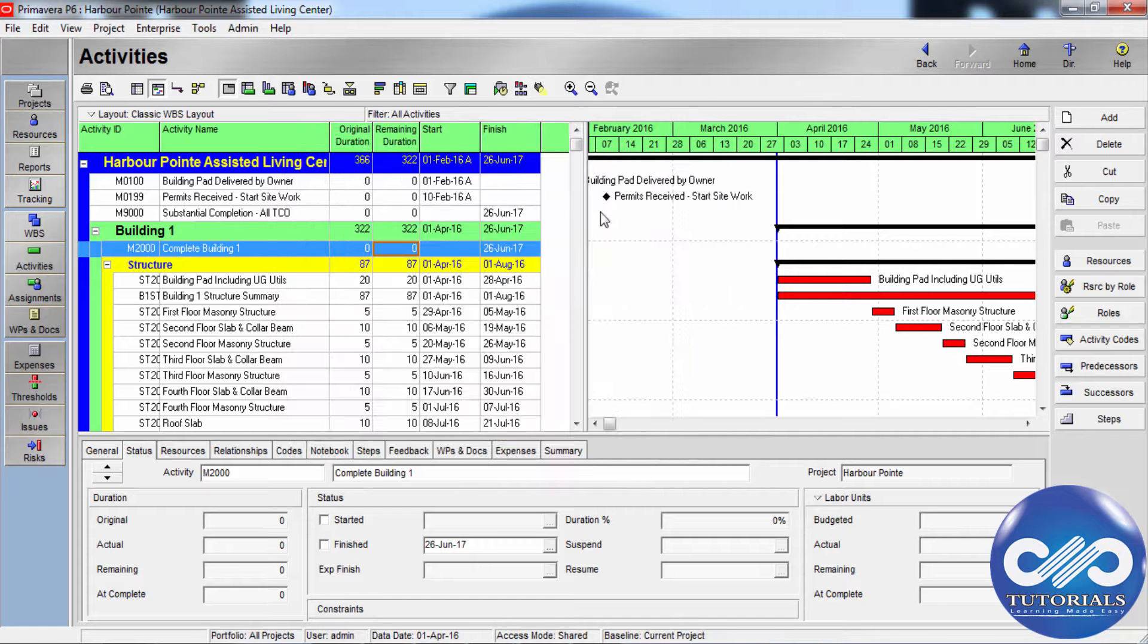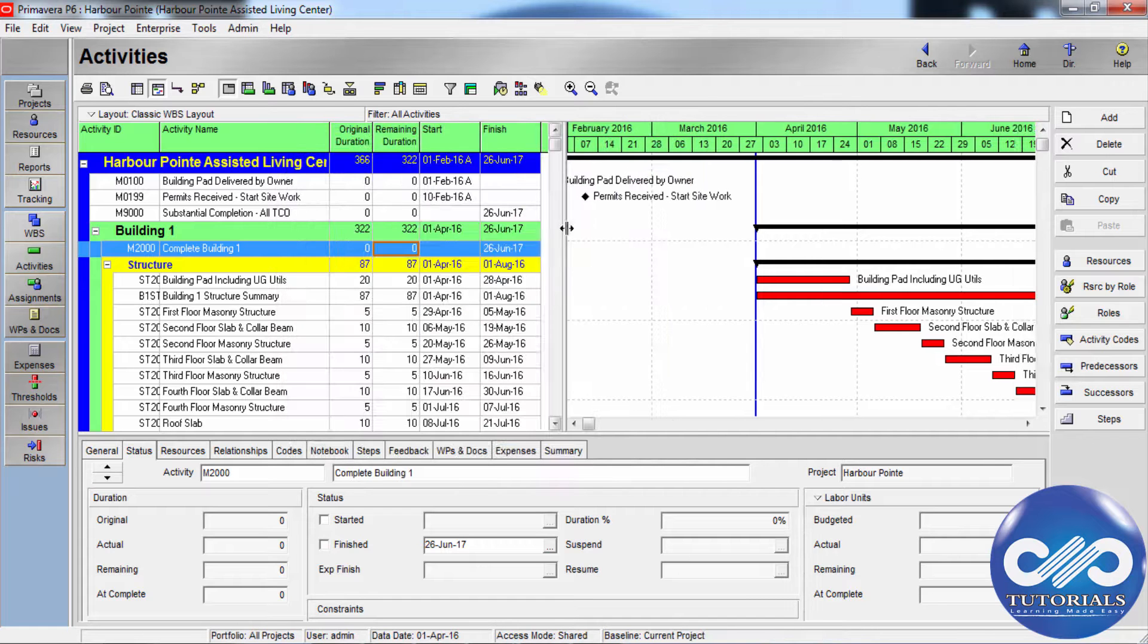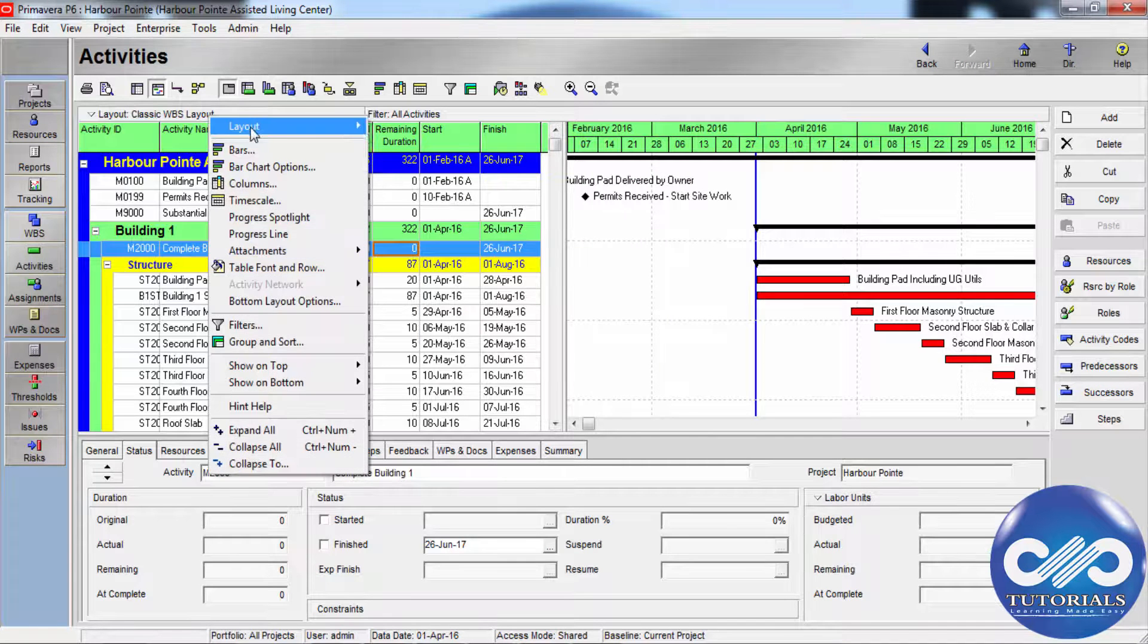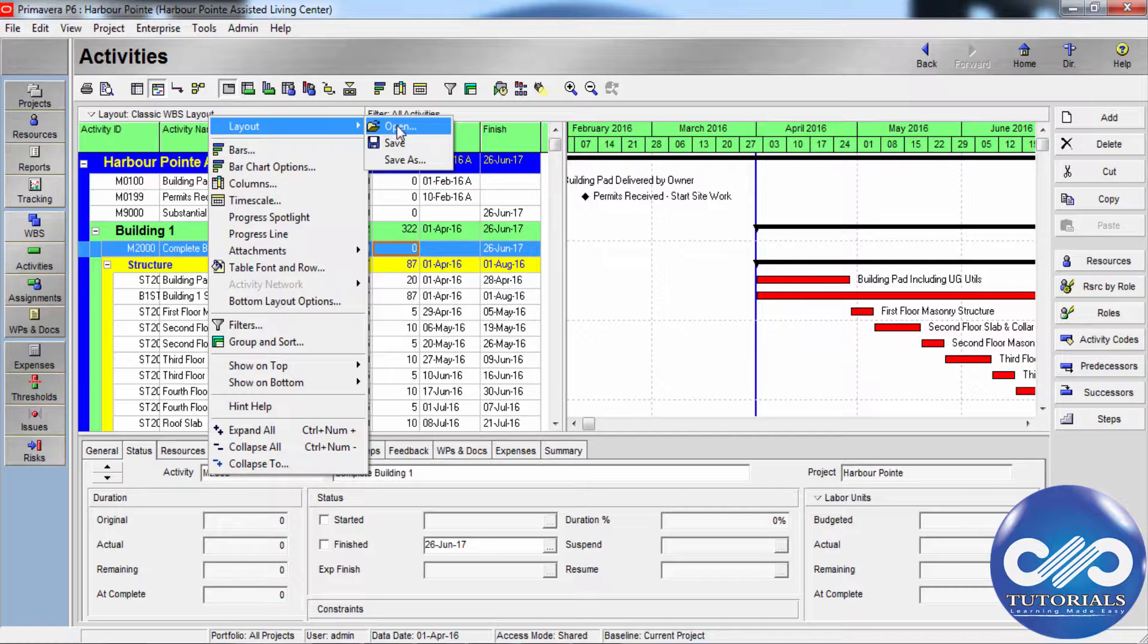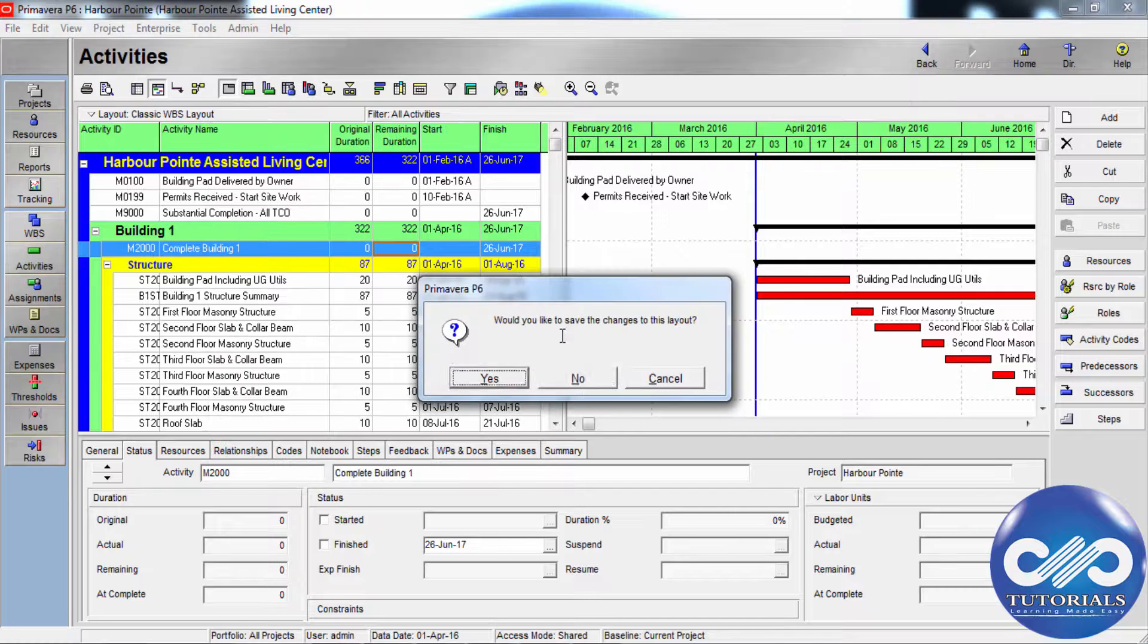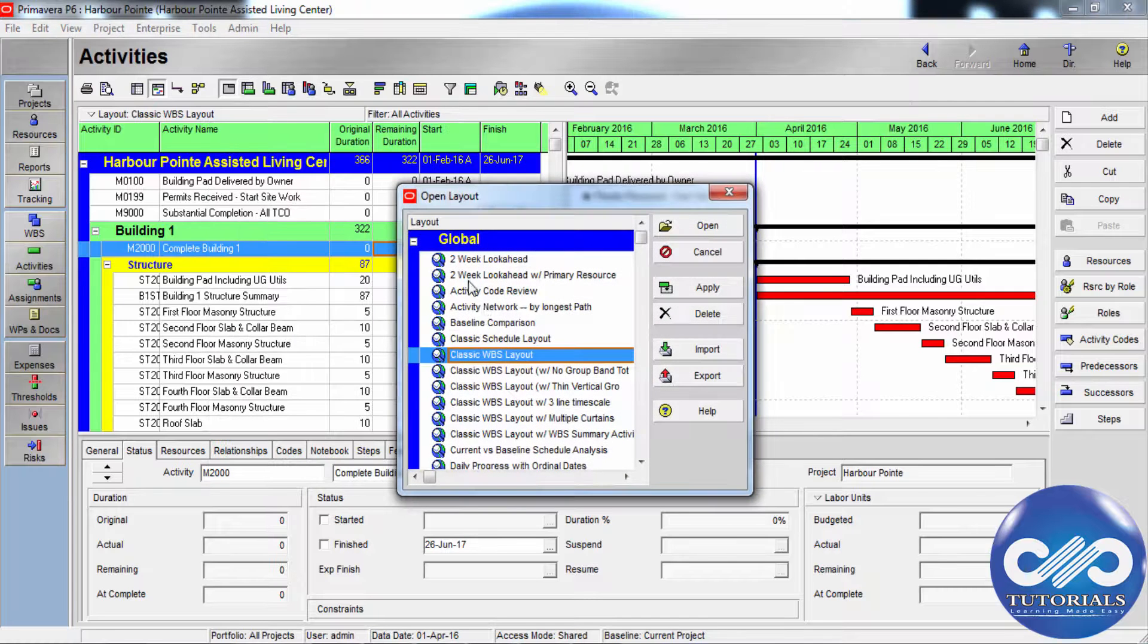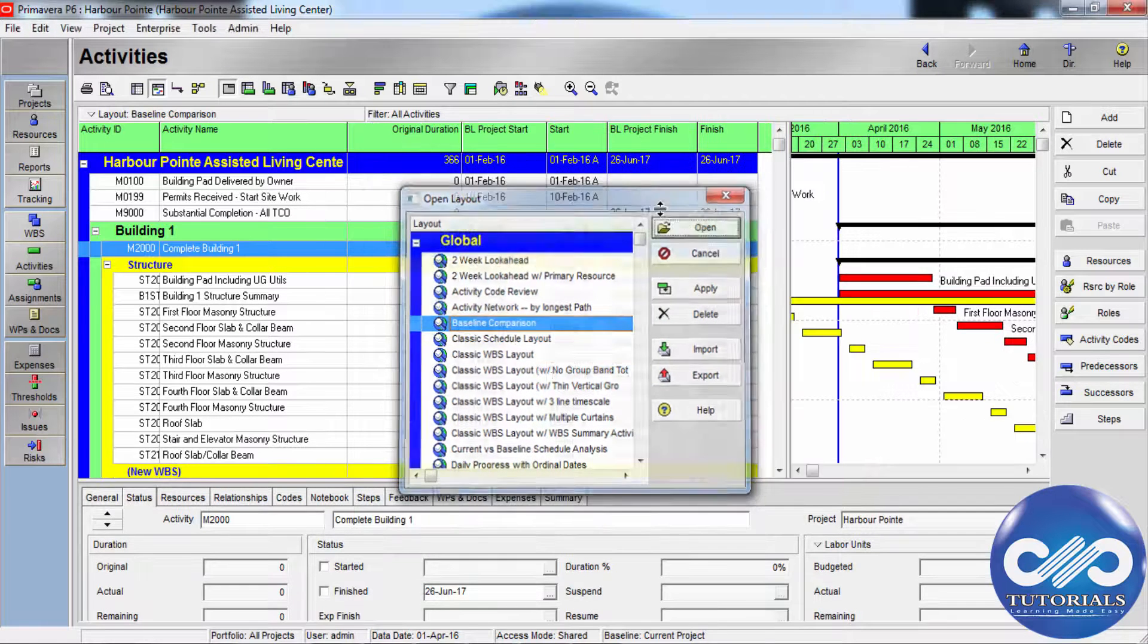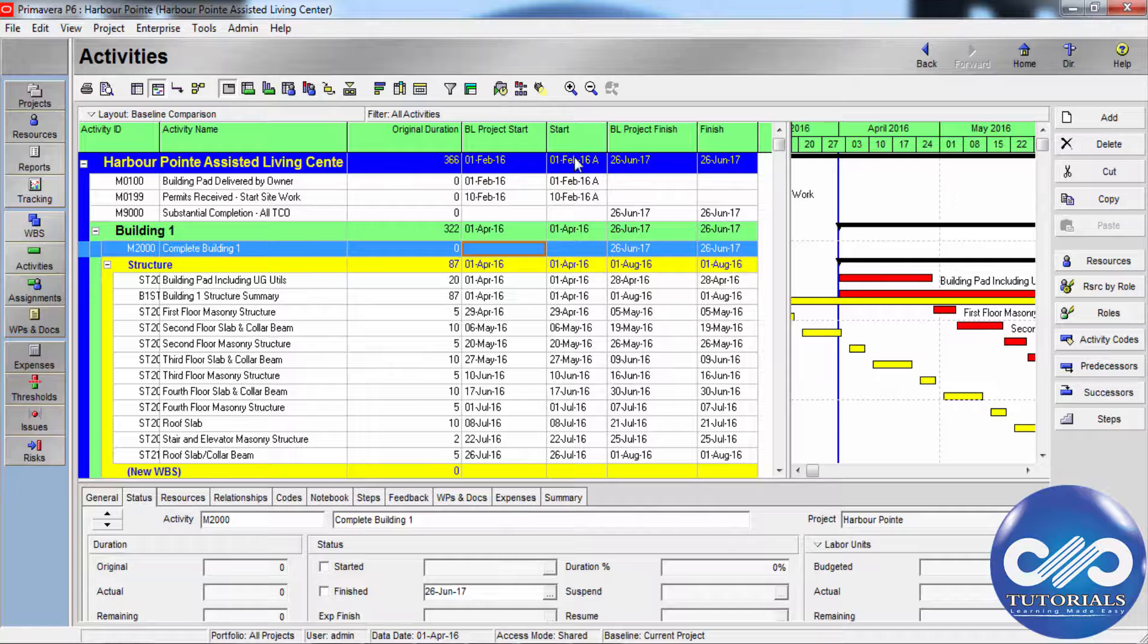Use a layout that shows current and baseline bars to identify tasks that start or finish later than planned. This can be user defined as per your preference.